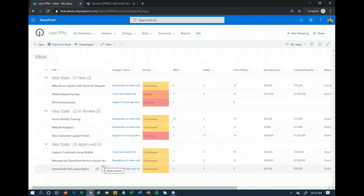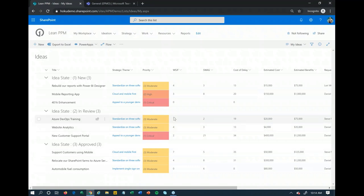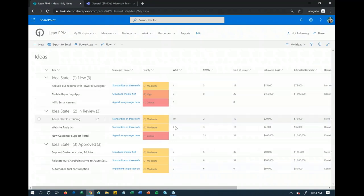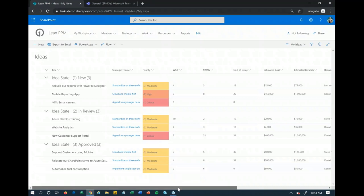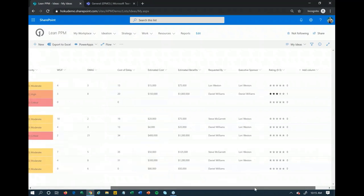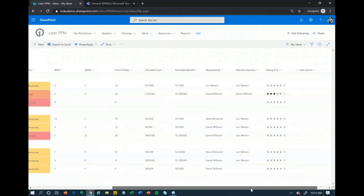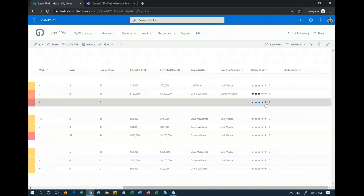When you do that, there's a high level of information you have to fill in. In this case, we're using the WSJF — or Weighted Shortest Job First — scoring method, prioritizing these requests as they come in. You can see WSJF scores that are calculated based off of inputs like business value and risk. I can also put in some high-level cost information — estimated costs and estimated benefits — as well as a star rating option if you want people to vote on these ideas.